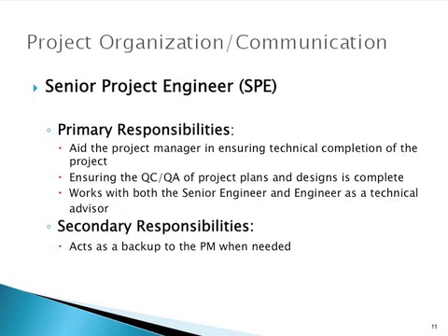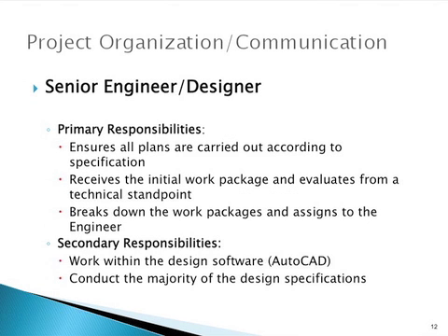The senior project engineer works as a technical advisor for both the senior engineer and engineer. Also, the senior project engineer is oftentimes a project manager in training and acts as a backup to the project manager when necessary. The senior engineer receives a work breakdown structure, subdivides that to the work packages for the engineer. The senior engineer also ensures that all the plans are carried out according to specification and works within the AutoCAD system as necessary.